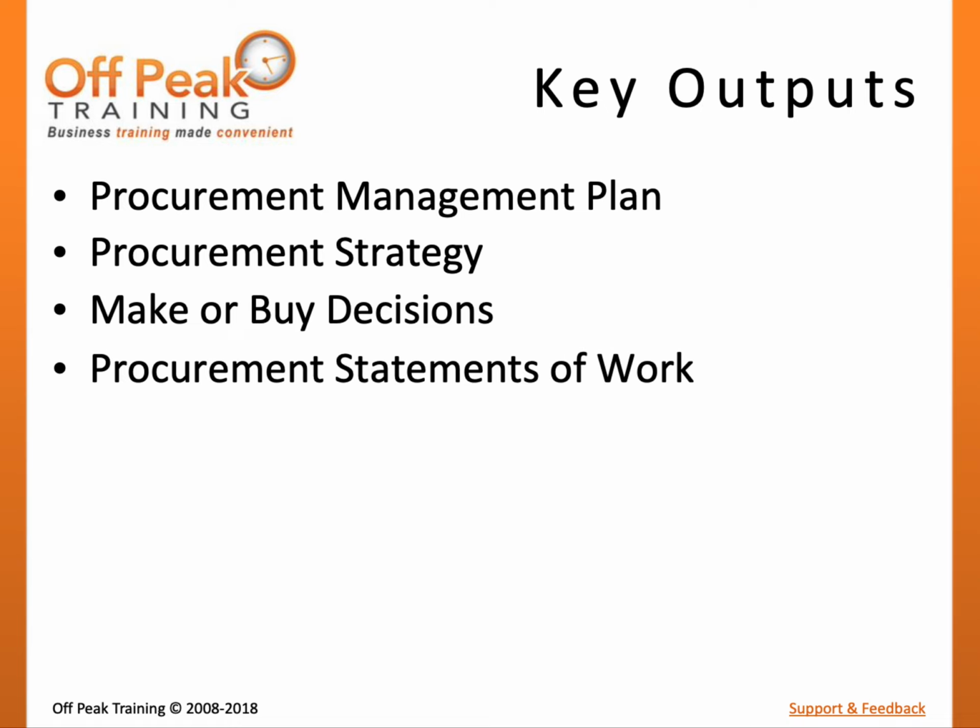Procurement statements of work is documentation of which components of the project scope will be addressed in the purchase or acquisition of each product or service. A procurement statement of work should be developed for each item to be procured and will be used by the seller to help formulate their project scope.